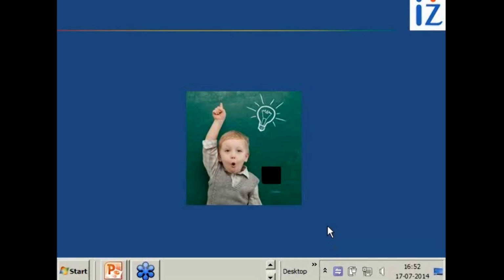Okay, so another question is, I am wondering, if visual responsibilities like in a pull system, where every member is aware of what they have to do and when, is helpful for the project, why can't it be adopted in other types of scheduling as well? Now, it can be adopted, and pull-based scheduling is becoming popular in manufacturing environments also. The only disadvantage you can think of is for a predictive life cycle project. Even now in the construction industry, we are talking about lean construction and they are following pull-based scheduling, but they usually have a top-level push-based plan, like a critical path plan, where they talk about how the construction would be done, and inside the phases, they follow a pull-based approach.